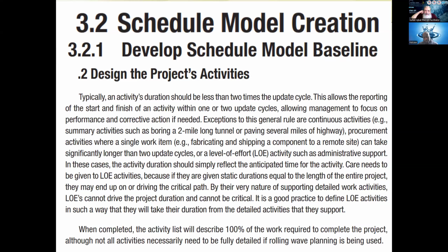So what we do is we make that rule that as a longer activity starts, it will be considered 50% complete right from the moment it starts because we have paid for it. It is not about the progress, it is about what we have spent. So 50% complete, and the day it is completed, no matter when, it will be declared 100% when he is paid the remaining 50% amount.